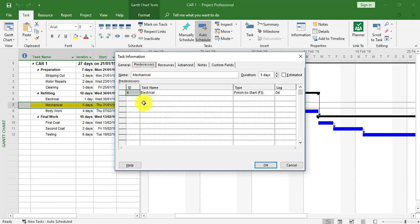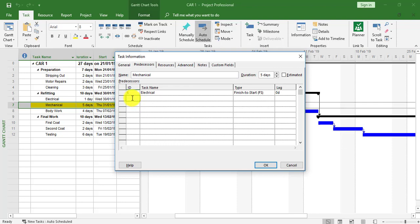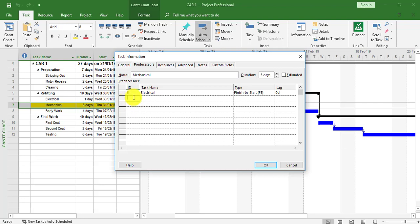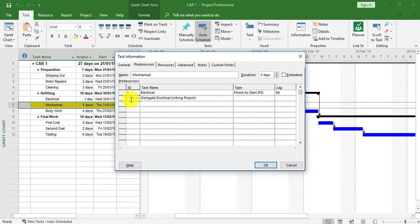I'm now going to form the link to Car 3. Sometimes you've got to put some number in the ID and then fix it by taking the backspace so the cursor is flashing in the ID area. I'm now going to do Control+V and paste. Now I've got the link from Car 3.